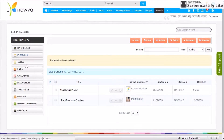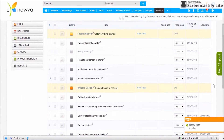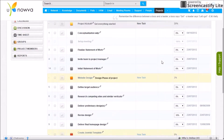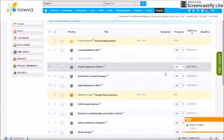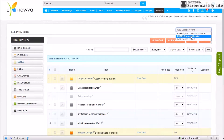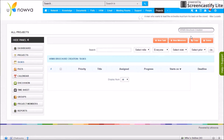After creating a new project, you need to set up tasks. Click on Tasks to access the tasks page, which displays a list of all tasks and milestones created for a particular project, with progress, start date, and end date beside every task. Rows with 'New Task' mentioned beside them are milestones, with an option to add a new task under that milestone. You can switch between projects from here.